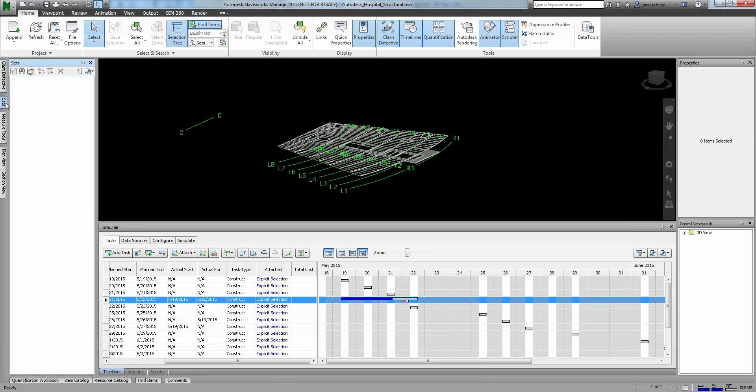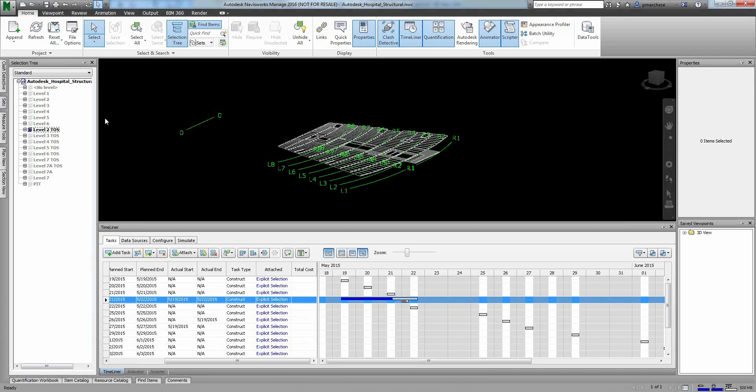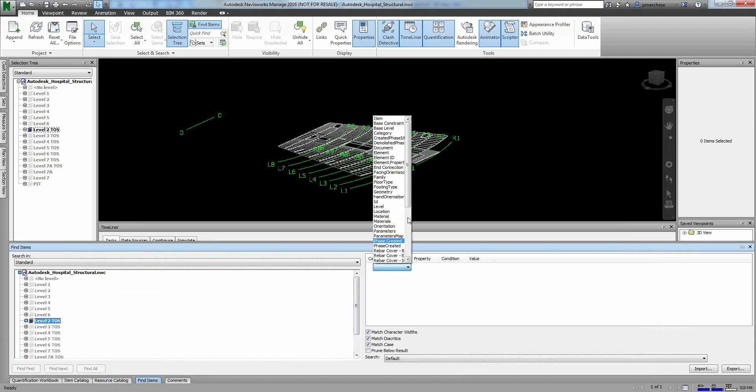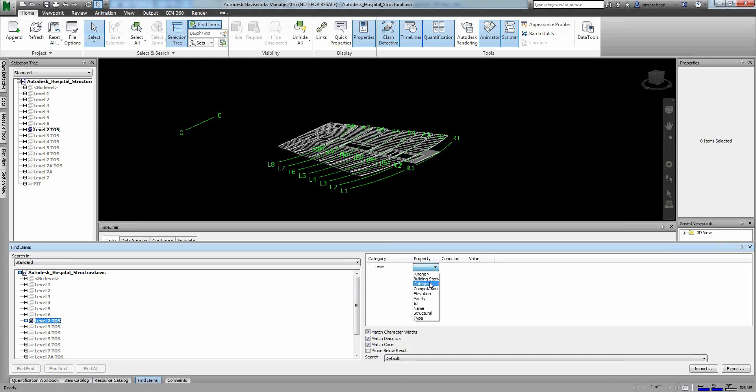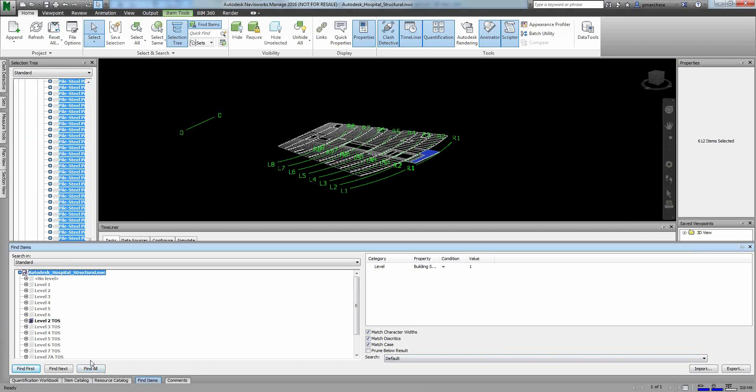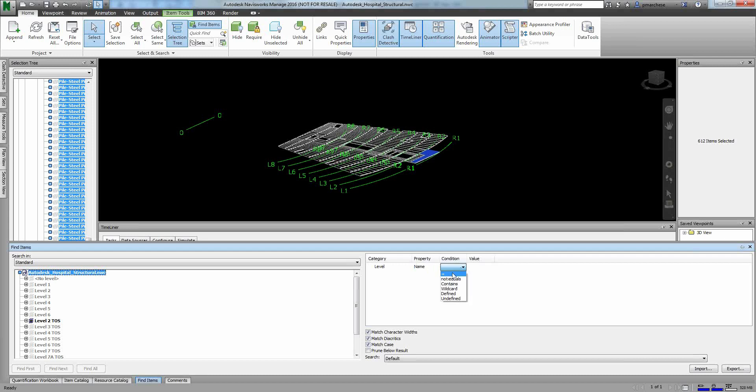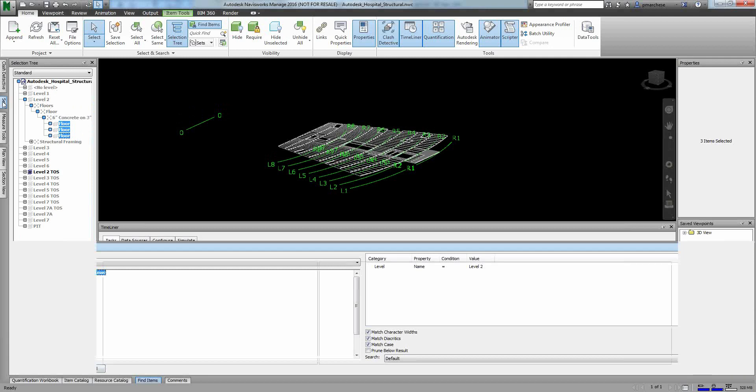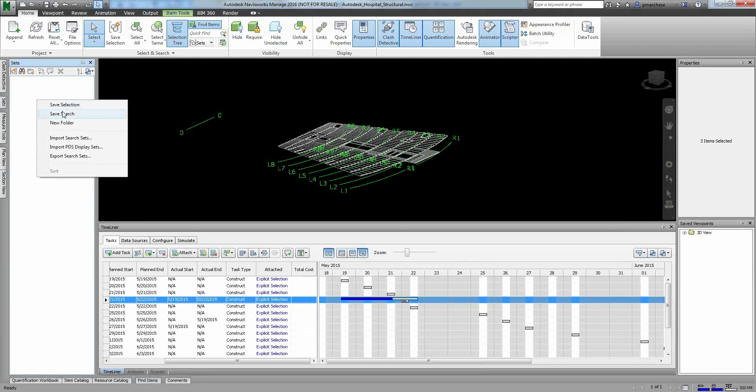Now in order to make that happen, you end up typically using sets. Now sets can be selection sets, meaning they're explicit, which in this case is again not bad, but if I want to make sure that they update very easily and I don't run into problems because of changes, that's not what I want to use. What I'd want to use is a search set. And the key about that is I'm looking at things here and I'm doing searches. In this case I could be looking for pretty much anything. So if I go there, let's see, building story equals one. And I can tell it to find everything that's on there. And that'll actually run through and find all the content that matches that value. So I change it from there and I say the name equals, say level two. So now that finds everything that's based off of the level two.